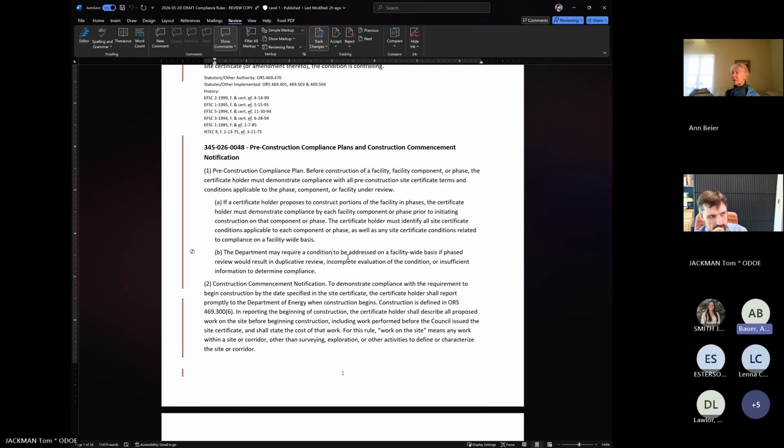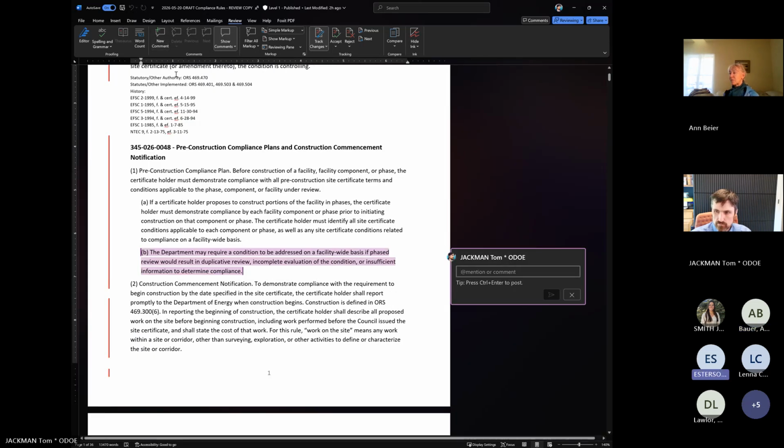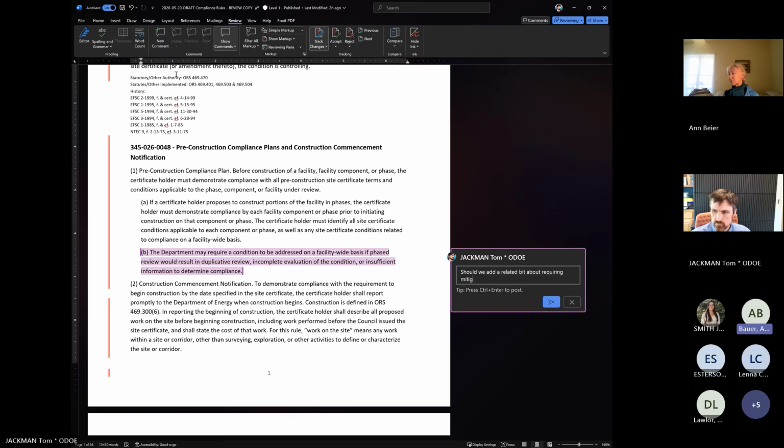Yeah, I mean, Sarah and I went through this same thing on our facility this last go around, and what we ended up agreeing with Sarah is that we weren't going to do any of the impacts that were going to have to be mitigated until the habitat mitigation plan was approved by not only ODOE, but also ODFW, and that the habitat acreage was acquired. And then no work was done on the habitat mitigation area, because the impacts ended up going on hold. But that's the way that we worked it.